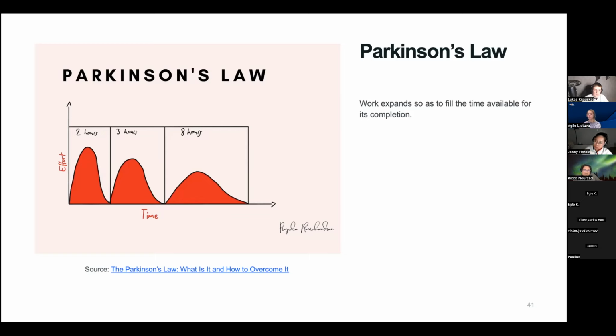But typically like 3 to 4 months, you're checking in and saying, do we want to keep this key result? Do we want to adjust this key result? Do we need a net new key result? These should change, but they shouldn't be so dramatic. And I think a lot of people who are coming into the practice of OKRs imagine that they have to go net new every quarter.